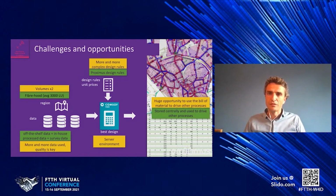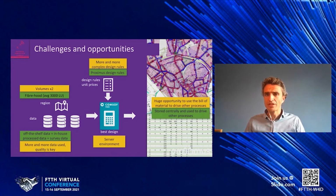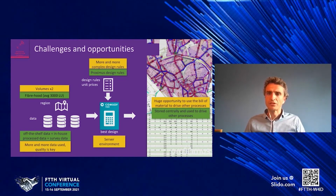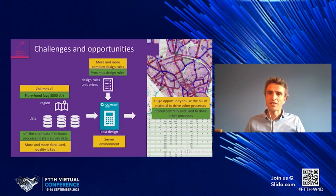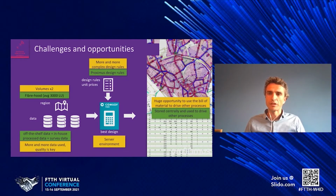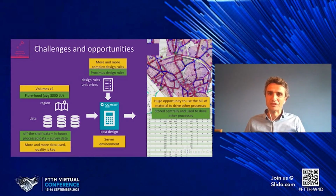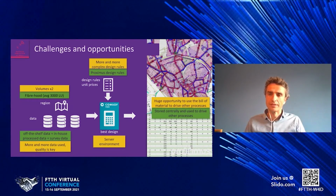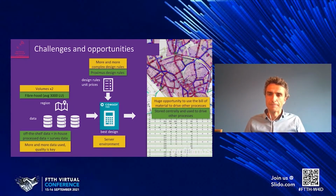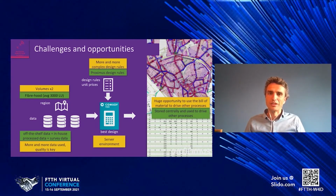They give a price per activity. We have prices per material component. And thanks to this, we can, for typical cities, compare in reality the price levels between our construction partners. That is a very positive outcome of this software and the cycle on how we use it. Those are the main points I think we should share today.